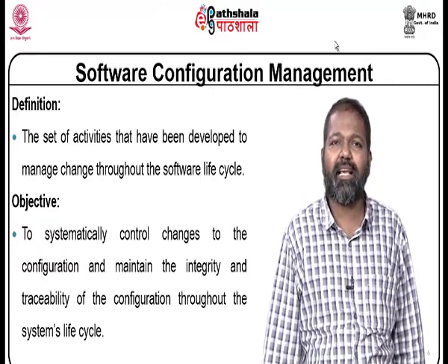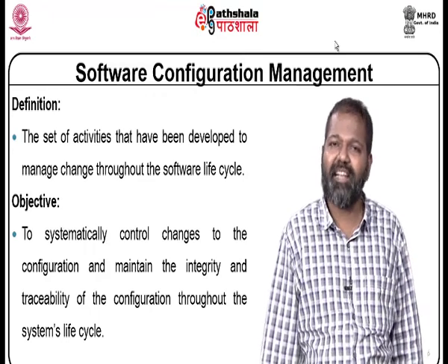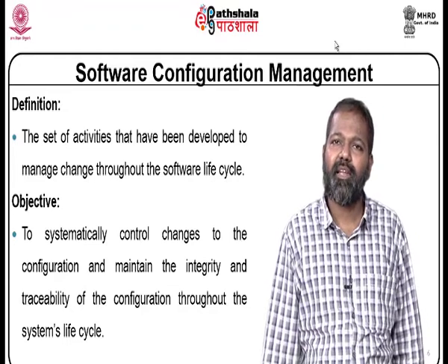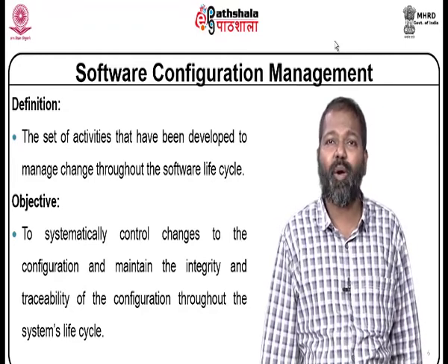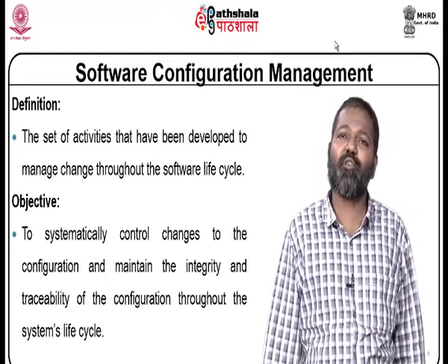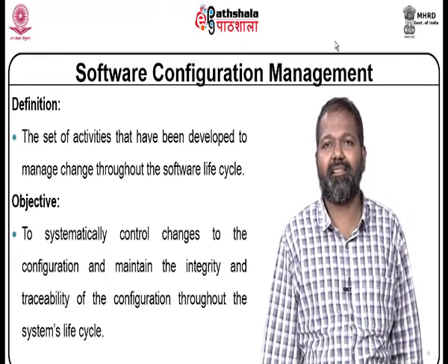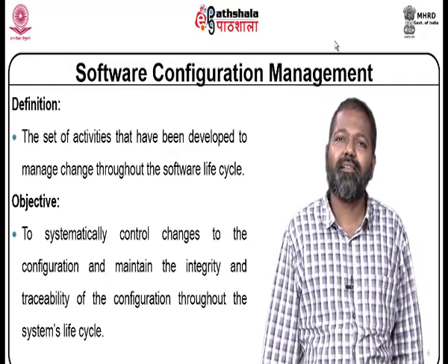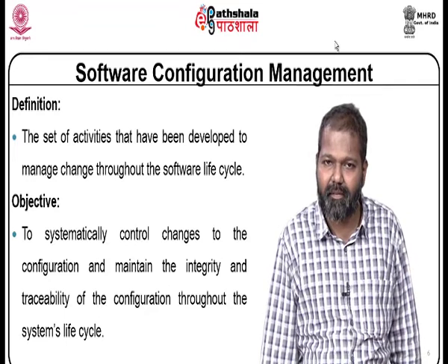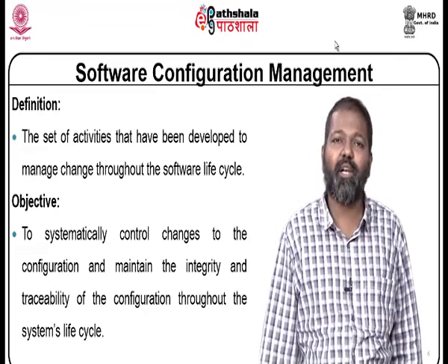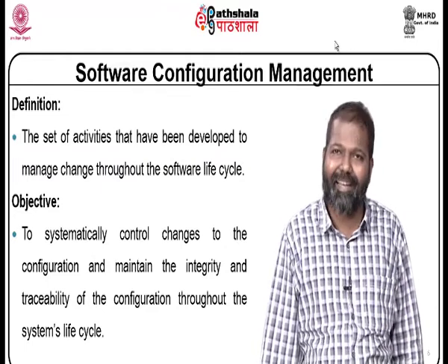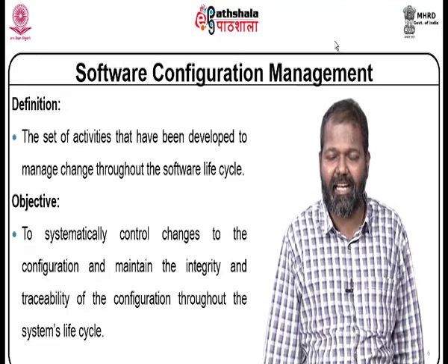You have completed the architectural design, the design has been approved, you are in detailed design. Now, when there is a change, your requirement specification document has to be modified, your architectural design has to be modified. In case detailed design is complete and then there is a change in requirement, the changing requirement has to be incorporated in software requirement specification document, architectural design and detailed design.